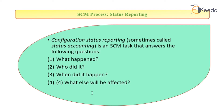The last stage is status reporting, also called configuration status reporting or status accounting. This is a SEM task that answers the following questions: What happened? Who did it? When did it happen? And what else will be affected? That means it keeps track of what change was done, who did the change, when the change was done, and what all things will be affected. That is all about the SEM process.